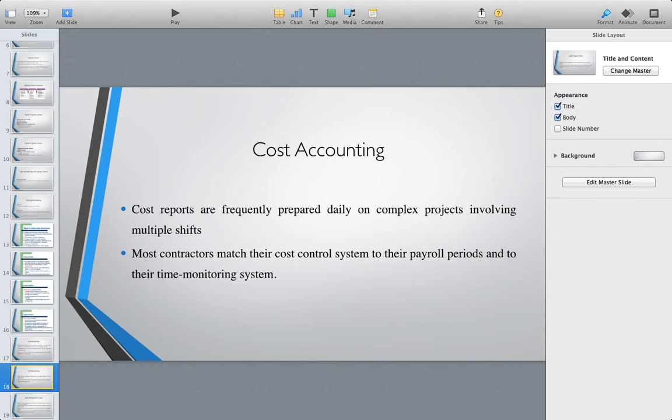And also on page 335, figure 12-9 has productivity problems and solutions. So we have a productivity problem, for example, the second one, incorrect installation techniques. What would your possible solution to that be? Field management provides training to the crew.